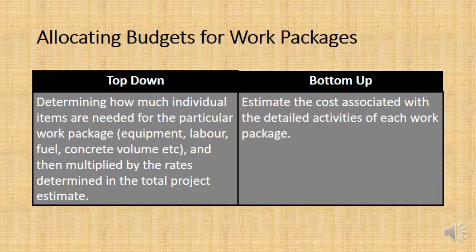That's why those sorts of things, mobilizing cost, transportation cost, establishing the site, that's often overlooked in a top-down approach, because the person who's making the budget for his work package just assumes someone else is going to include that in their work package, and then it doesn't get included. And so when budgets are below the real cost, this is often what happens. It's from a top-down approach.